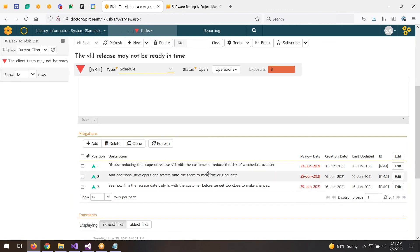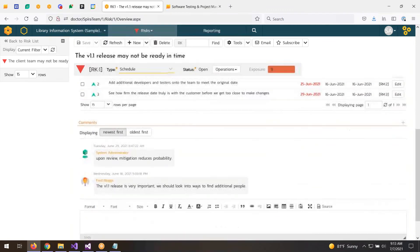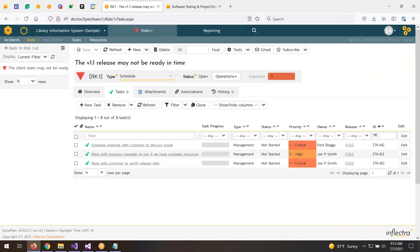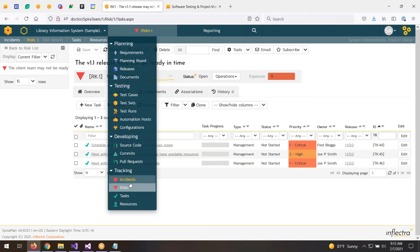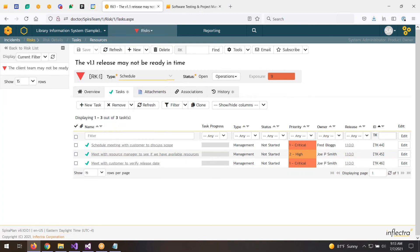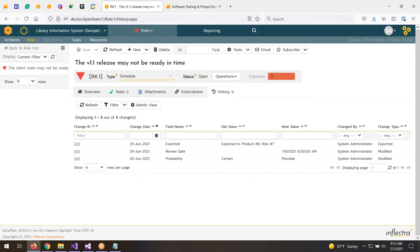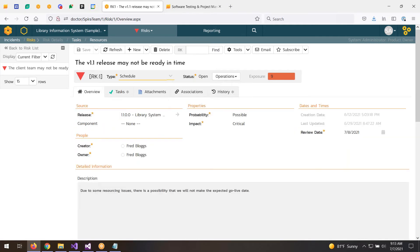Under the description we write the mitigations — how we're mitigating the risk — and we can put a review date for each mitigation. Under that are the comments for reviewing the risk. In the tasks section, you can create the action items to implement the mitigations, and we can track those in the project plan. The last part is the history, which shows any changes made to the risk — a full audit trail.